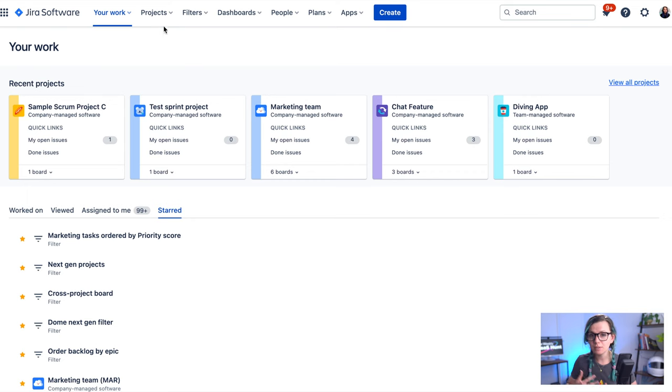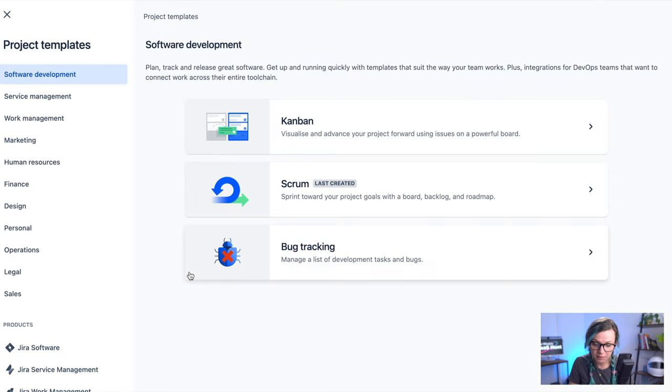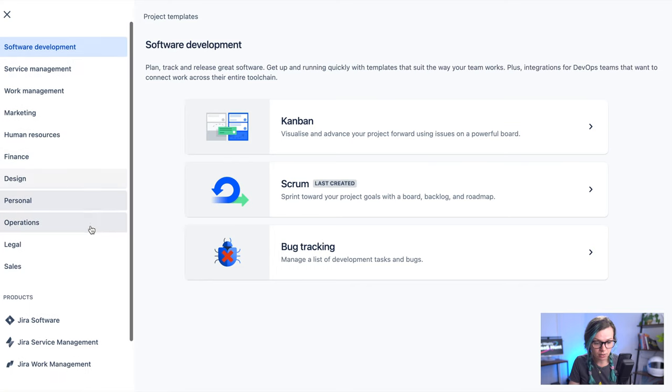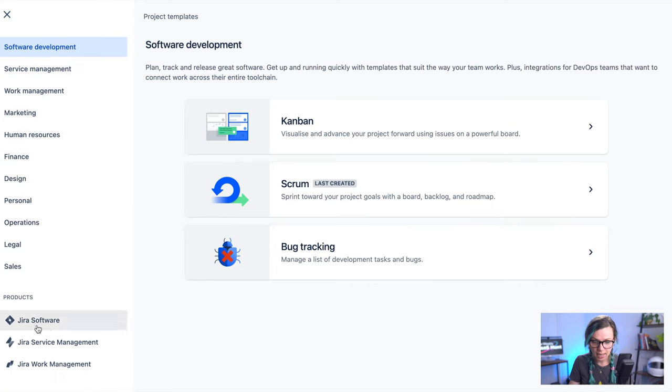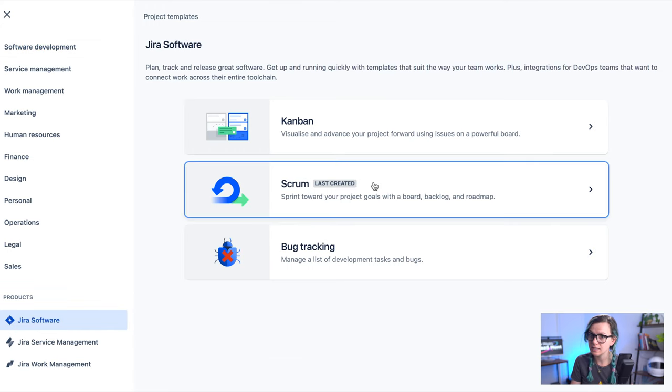There are multiple types of projects in Jira, but only a Scrum type of project allows you to create a sprint. So you just click on create project button and then on the bottom you find Jira software and here is Scrum.